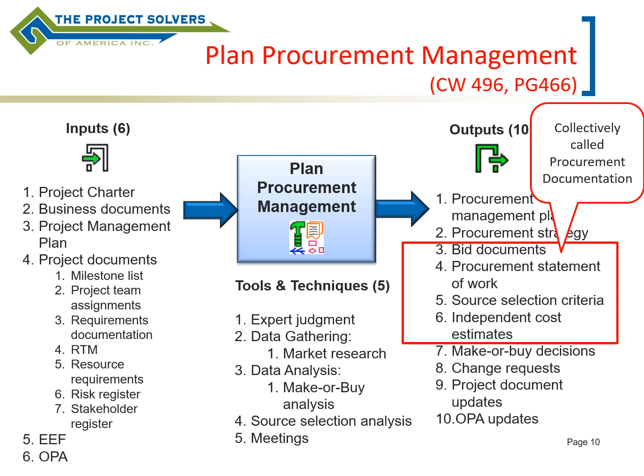So the other thing that is unique about this planning process is that it has the ability to issue a change request if needed. And that could be because doing something by outsourcing may require a change in the requirements or some other areas that you've already got under configuration management. And so there you've got the ability to issue a change request.